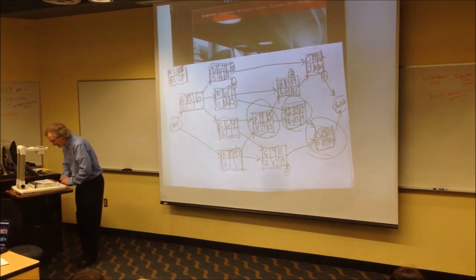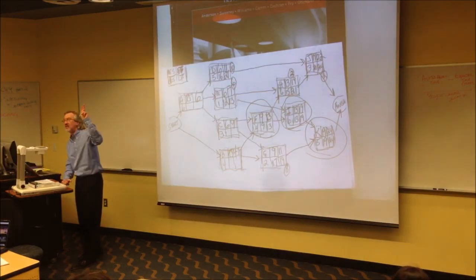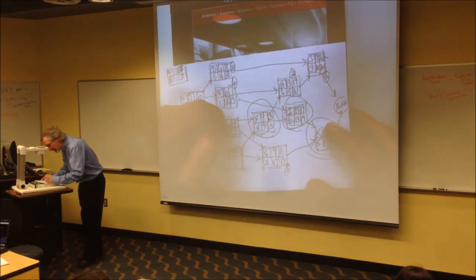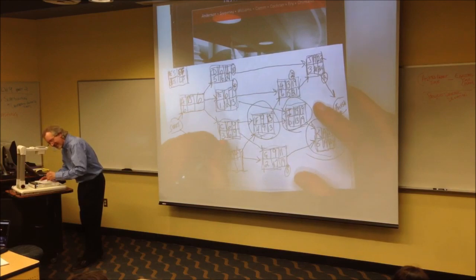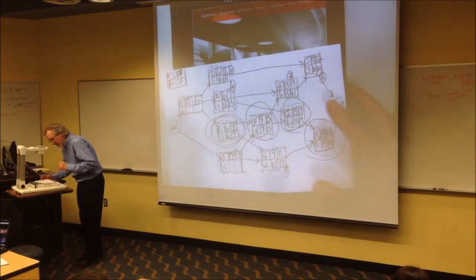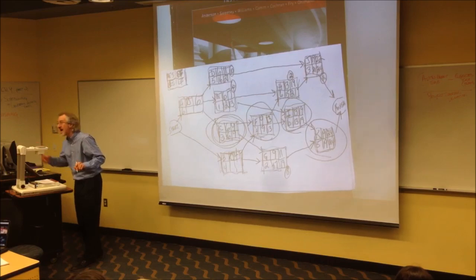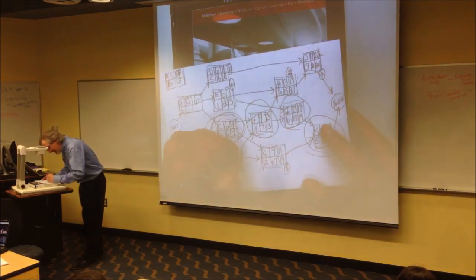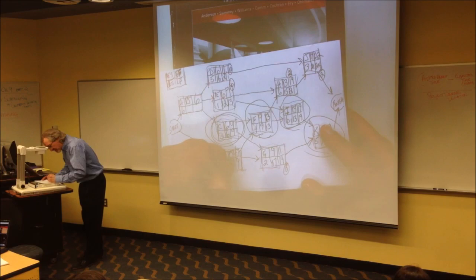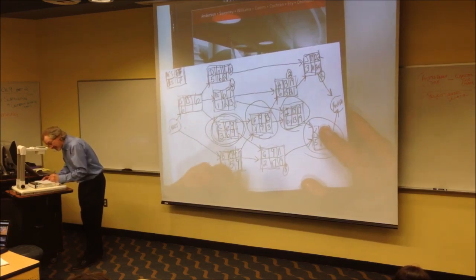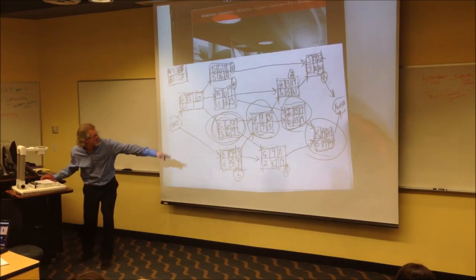C has 2 activities. What are the 2 numbers we're looking at? 17 and 9, we're going to use which one? 9 minus 3 is 6, slack. B, 2 activities. What are the 2 numbers we're looking at? 17 and 9, we're going to use which one? 9 minus 4 is 5, slack. 5. Either the difference between 9 and 4 or 0 and 5.